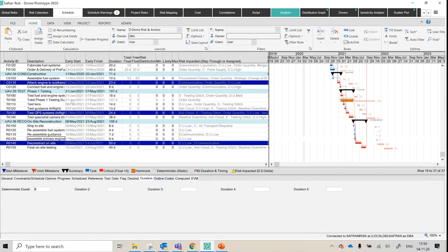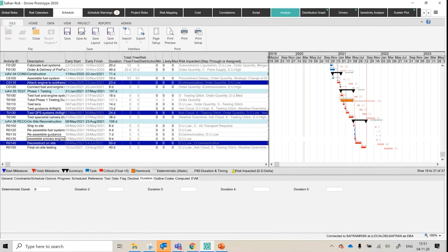But you could do right click, assign fields, set a formula, pick the P80 duration, send it to an empty, not being used user field, export via the file.